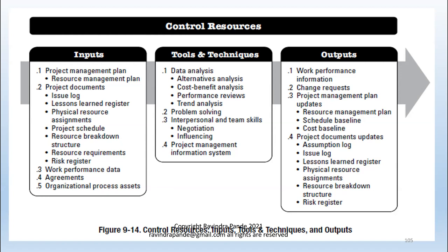Only as a project manager, I can decide if I want to park this change request for the next sprint or not. Again, it depends on the length and breadth of this change request also. If it's really small, I might get it done anyway within 5-10 minutes. If it's really big, then I need to consider if my schedule can absorb such change requests within my current project plan. The project plan updates are the resource management plan, schedule baseline, and the cost baseline.